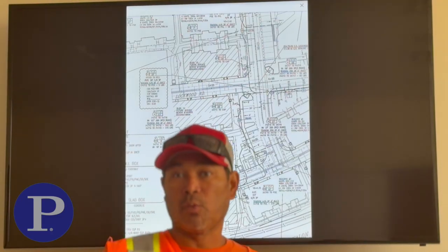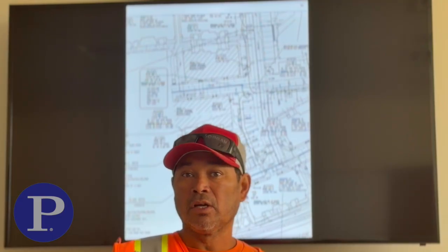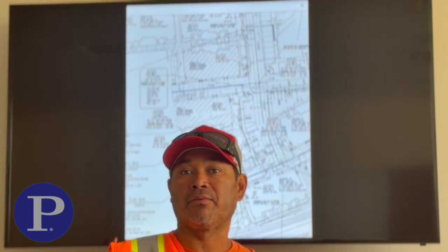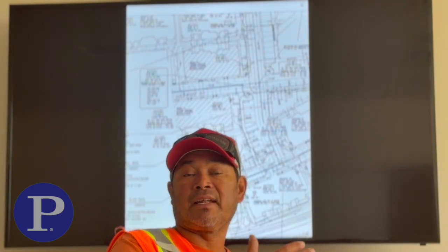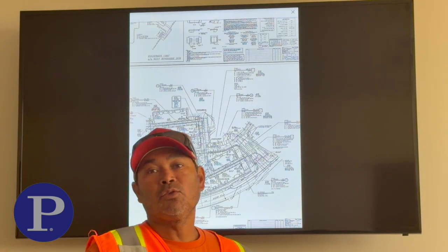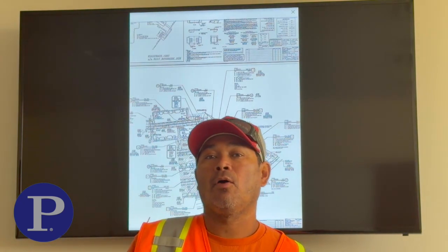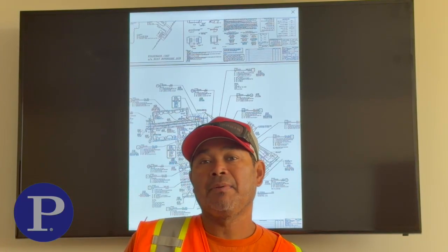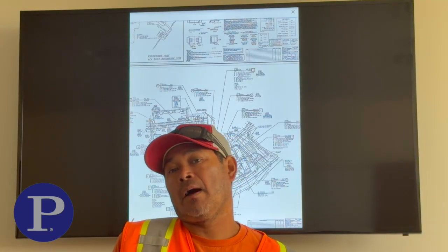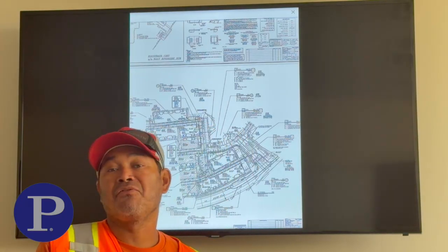So when you have those, we have to make sure we understand that all those angles need to be reduced from the straight line footages. That way we don't have to order 4,000 feet of pipe when you're just going to need 3,000, because the other 1,000 is going to be all in different angles. When I did my math on this specific job, about 800 feet is going to be total angles. So we have about 75 45 by 150s, each one of them measuring 9 feet.